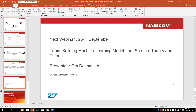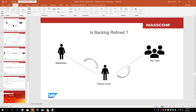On the story writing template — just search Google and you'll find many examples. The best practice is: as a persona, what are you doing, what feature are you trying to use, and what value is being created. It's similar to the slide shared. It should be oriented toward the user — what action they are doing and what value comes out of that. That's the standard template being followed.